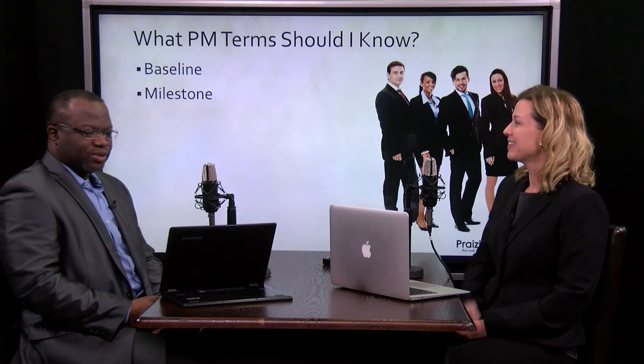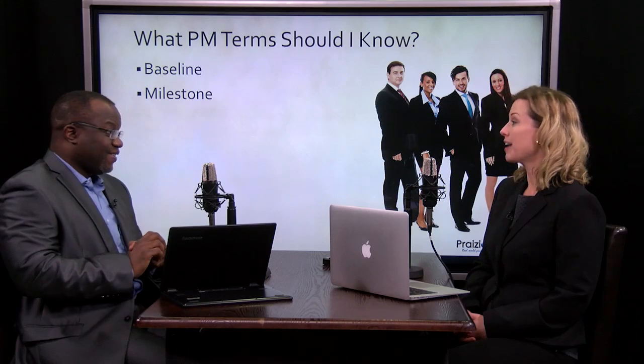You might call it a performance baseline. It's up to you what type of baselines you want to have, but a baseline is a key term. That's true. Baselines kind of help keep you on the straight and narrow, right? Yeah. So people often refer to their baselines as the original plan without being changed or modified. And if it's going to be modified, then it needs approval, right? Yeah, you absolutely need approval.